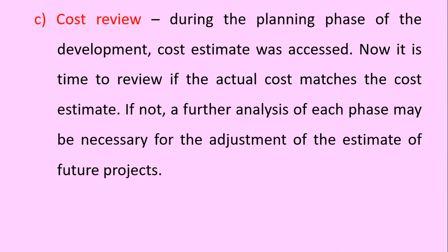Number three is cost review. During the planning phase of the development, a cost estimate was assessed. Now, it is time to review if the actual cost matches the cost estimate. If not, a further analysis of each phase may be necessary for the adjustment of the estimate of future projects.